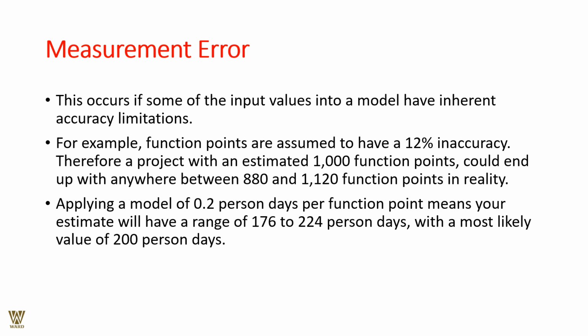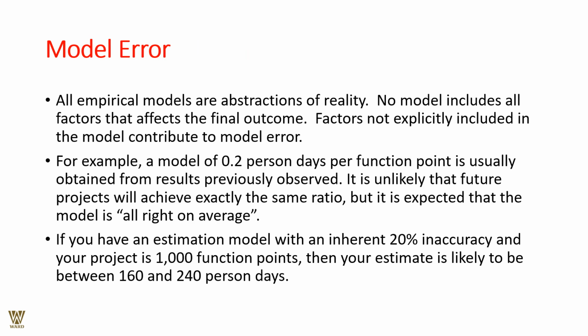Applying a model of 0.2 days per function point means your estimate will have a range of 176 to 224 days, with the most likely value of 200 days. Next, there is model error.